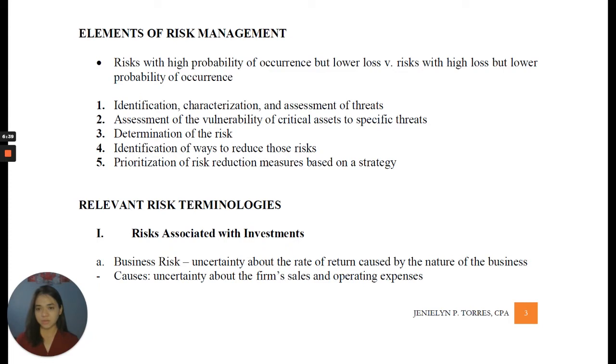The elements of risk management are: first, identification, characterization, and assessment of threats. Second, assessment of the vulnerability of critical assets to specific threats. Third, determination of the risk. Fourth, identification of ways to reduce those risks. And fifth, prioritization of risk reduction measures based on strategy.